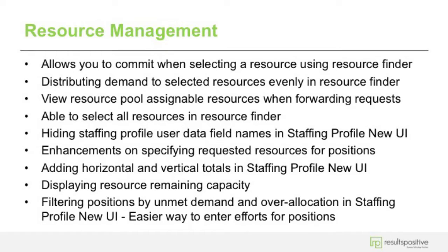Now if you're a resource pool manager and you want to forward a resource request, you can actually see the available resources in that resource pool as you're pushing that request. The reason for that is there might not be any available resources in that resource pool, so you might want to select a different resource pool when you forward those types of requests.